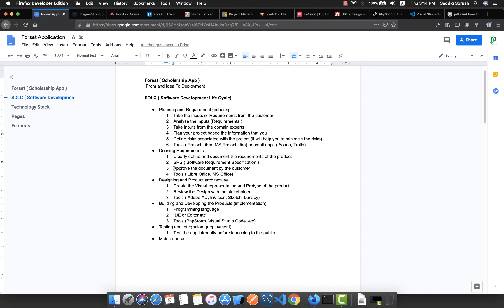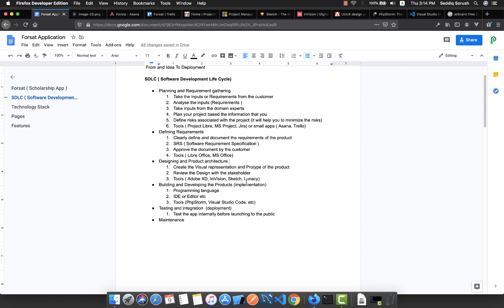In my experience, this is really crucial work that a software developer or software engineer needs to do. If you don't approve the document or requirements by the customer, the chances are if you move along at the middle of the project, they will say 'No, I didn't say this one, I want this one.'